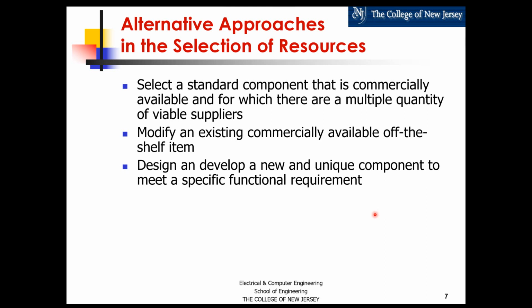And on the side of making your own technology and your own component or part, you may not have the expertise. It may take you longer. You may be able to get something that is much less expensive at the end, but you have to analyze, from a timeline and cost perspective, whether you are going to recoup your investment, and from a time value of money perspective.